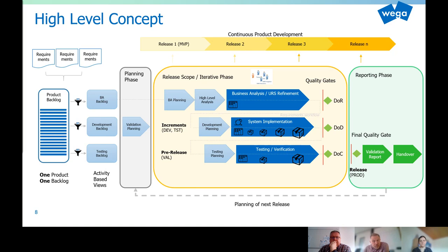Nevertheless, while preparing all the necessary test documentation in the development phase, deployment on our test environment for sprint reviews and the informal test execution, we perform a staging to validation for selected increments. Deploying each increment would be too much effort. On average, every second increment will be deployed on validation. On validation, we execute the test scripts and we document this execution.